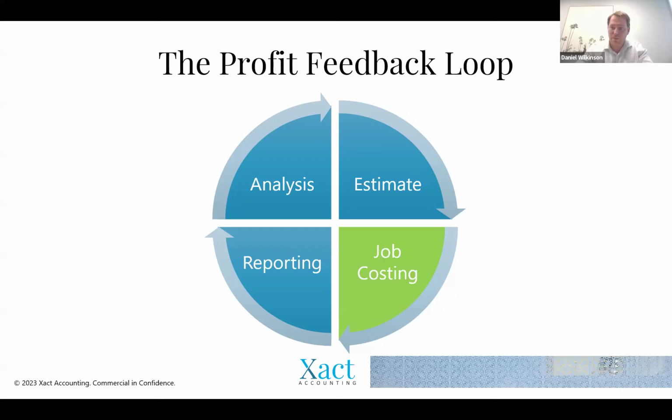So that needs to happen monthly at a minimum. You can't get to the end of the project and go, well, the build's going to cost us 1.5. And if you can't micro measure the stages and the items, we have to measure it as we go through so we can get that feedback and go, well, the tiling and bathroom suite blew out because we had a dodgy trade, as an example.